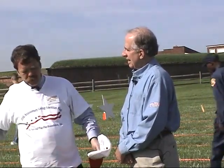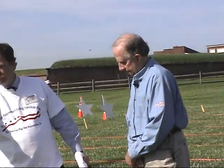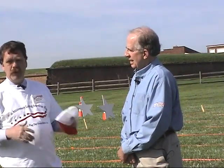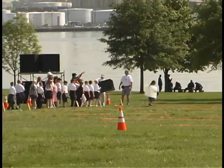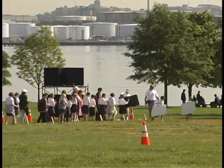Once we do that, we have this big grid of 3,000 squares. Then we run ribbons down, you see some in here and here and in back of us, to actually mark the different colors, separating one stripe from another. When you're trying to control this many children, you need to make it as simple and as obvious as you possibly can how you're going to keep them organized.